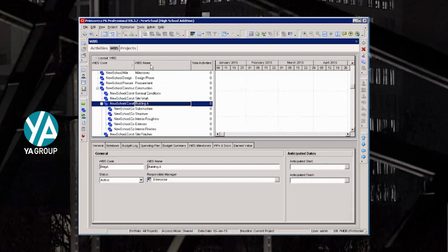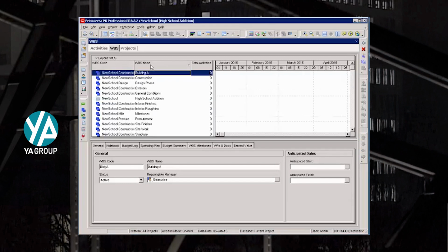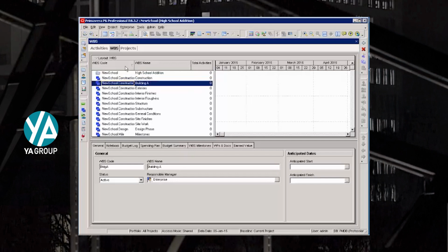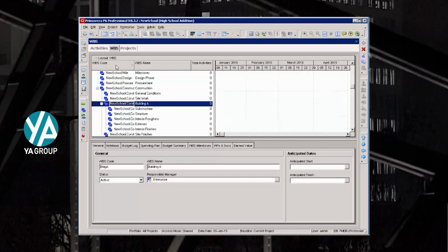In all of your table areas, you can always sort by selecting a heading. This usually comes up in the work breakdown structure. In my classes, someone will accidentally select a column and will lose their hierarchical view. Since it is hierarchical, I can sort by this column, view ascending and descending, and the third option puts it back into that hierarchical view. So if you lose your hierarchical view, you need to select that column heading until the outline shows up again.